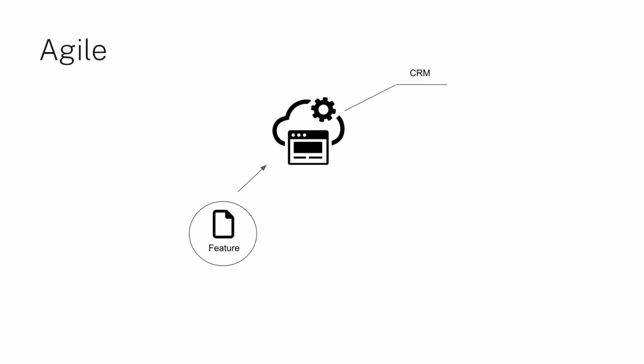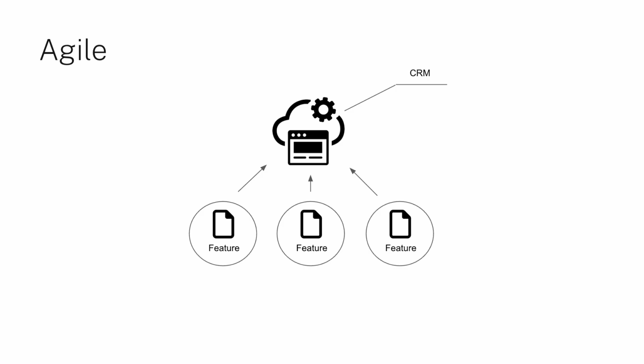Then we develop stock module and release it, for example, during the next 3 months. So our users can already use two modules while we are developing the third module. And finally, in 1 year, we are releasing the third module. Therefore, Agile concept says that we can release valuable pieces of functionality for end users at earliest possible time. So the main difference between Waterfall and Agile is that Waterfall delivers a product as one chunk at a time, while Agile allows to split outcomes in pieces and allow users to use outcomes much earlier than Waterfall approach.